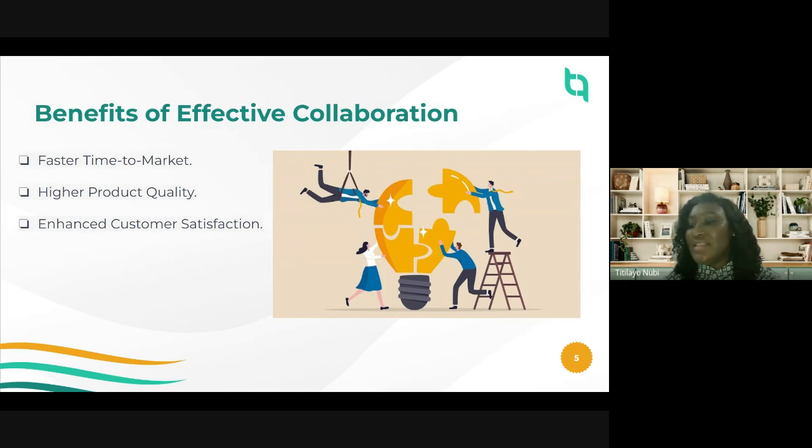The team is meant to deliver these things at a particular date. For every user story, there are probably estimations and time they are meant to deliver, because it moves from one box to the other. From to do, it moves to in progress, it moves to code review, it moves to QA. And if it's not getting to the right box at a particular time, you are more or less dragging the team back. So sometimes a lot of things happen within the team and within the sprints that may not allow you to deliver what you're meant to deliver.